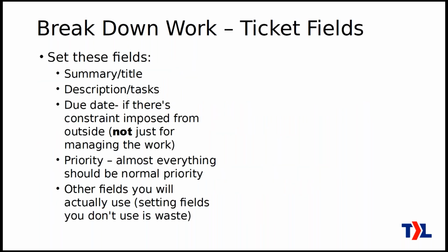So as far as actually filling out these ticket or task fields in your PSA, what fields are you actually going to use? Well, you're going to use the summary and title, obviously, description and tasks if you want. The due date, that's only if there's a constraint imposed from outside. So you're not going to set the due date for the purpose of managing the work.